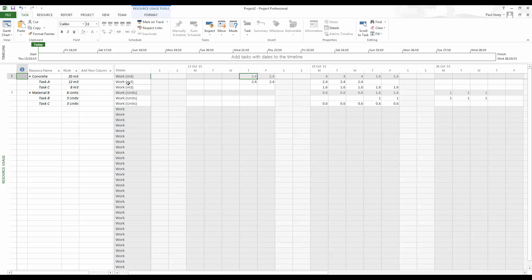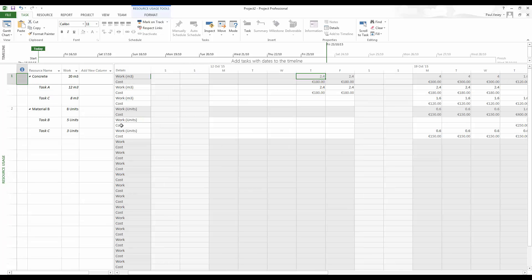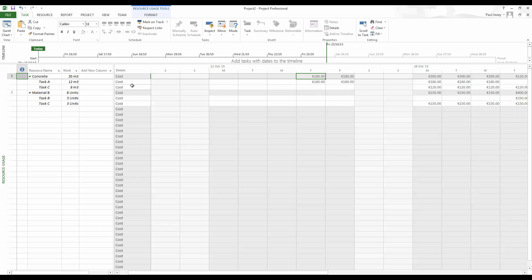And also, if you want to see, again, day by day, how this is working out in terms of cost, you just flick that over to cost. So right click. Let's turn off the work there. So right click, use the menu here, and select whichever one you like.